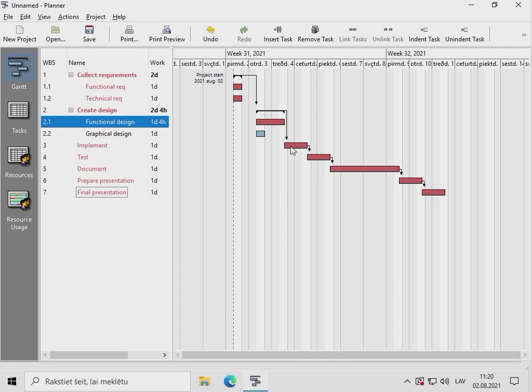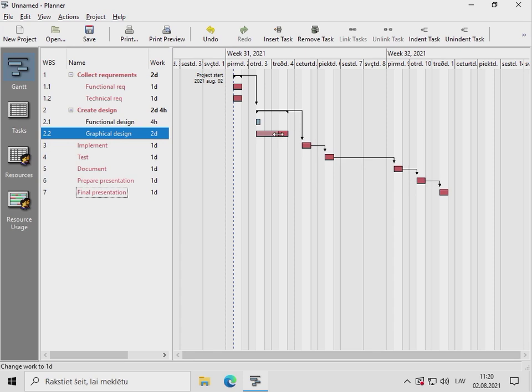For example, if I have the following dependencies, and two tasks may be done in parallel, concurrently, then the task which is longer is the critical path, because a change in its length, for example if it's behind schedule, influences when the entire project will actually end.